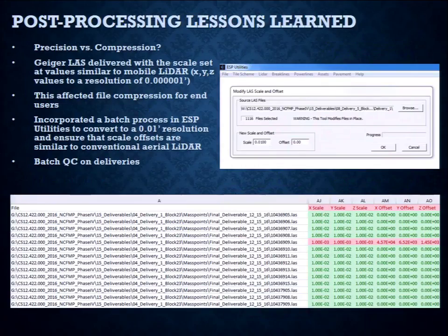But there was a ton of survey that was done. This is another lesson learned. We were working with the Lidar data set, and we're trying to use the new LAS 1.4 specs. And there was a scale factor that in the processing, they had just left it to all the digits that it had, something like 16 digits. Well, as we tried to compress that data and as we tried to use that data in our systems, we realized it was killing our file size just for that one piece of data that had all those digits. So we had to have them go back and review how to pull those digits back to what the requirement for the project was so we wouldn't be lost in file size over something that's really minor.